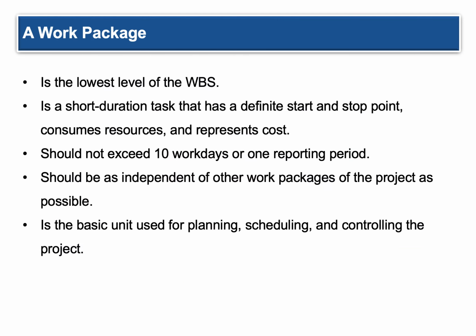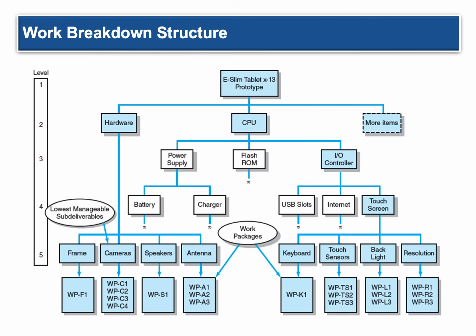So, a work package. It's the lowest level of the WBS. So it's down here, okay? A work package, lowest level of the WBS, is a short duration task that has a definite start and stop point, consumes resources, and represents costs. So as you break things down, these are high ideas, like, hey, I don't know how much this tablet's going